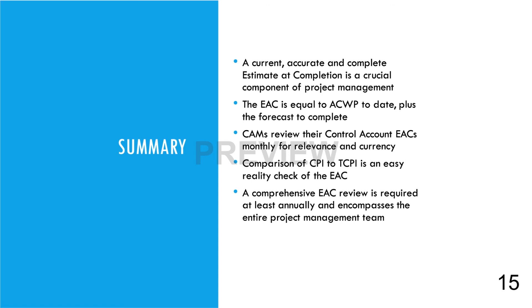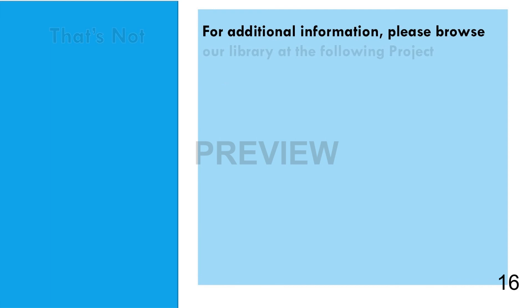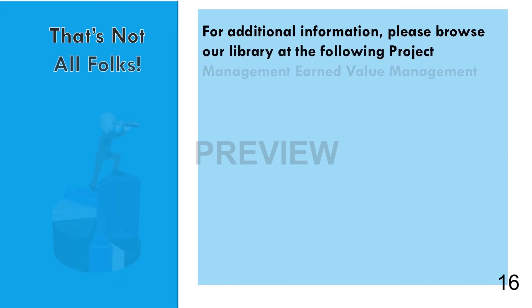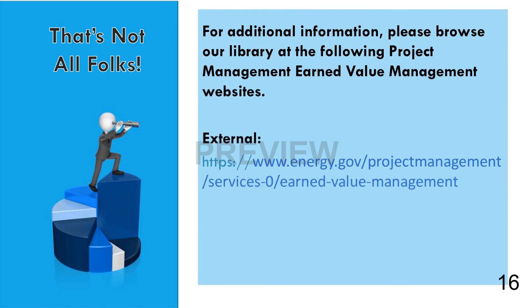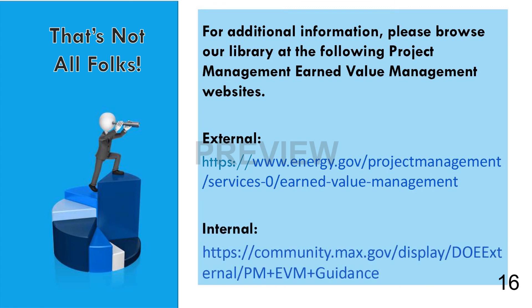In addition to monthly updates, a comprehensive or bottom-up EAC update is a formal process involving the entire project management team and is required at least annually. For additional information relative to EVMS procedures, templates, helpful references, more snippets and training materials, please refer to DOE-PM's external EVM homepage or the internal max.gov PM library. Check back periodically for updated or new information. Thank you for using the Snippet Library.